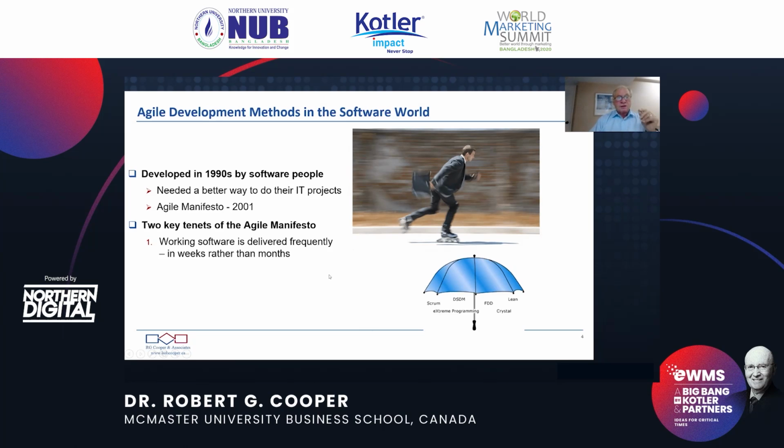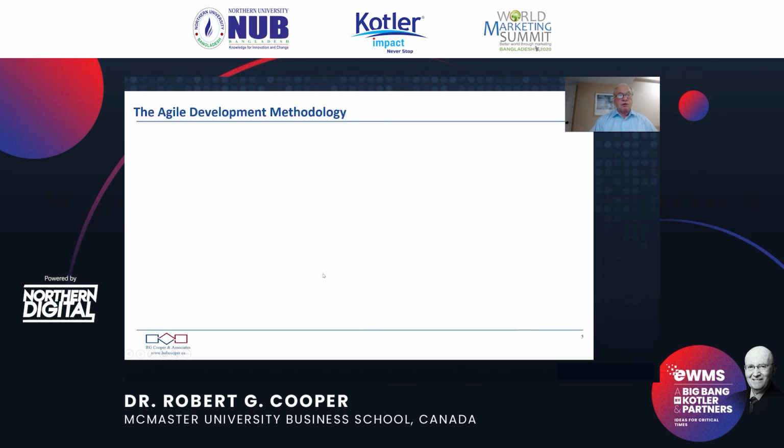Number one, working software is delivered frequently, not in months, but in weeks. In other words, every couple of weeks, you have something you can demo to a customer. That's something that actually works. The other key tenet is that working software is the principal measure of progress, not PowerPoint presentations, not milestone reviews, but software that actually works. What have you done? What have you accomplished? Show it to me. This is the key measure of progress.